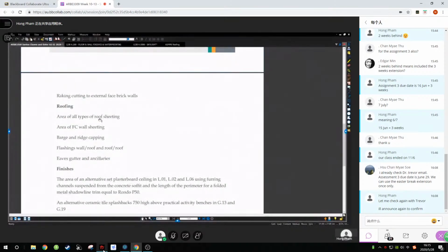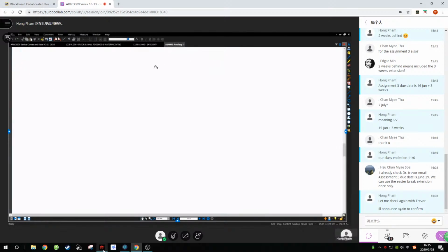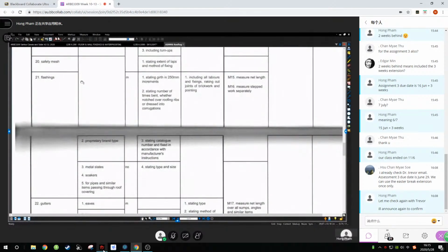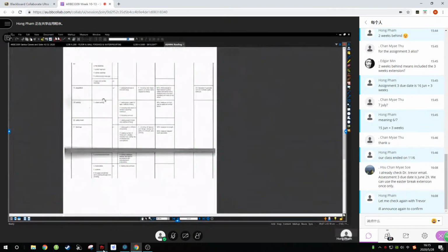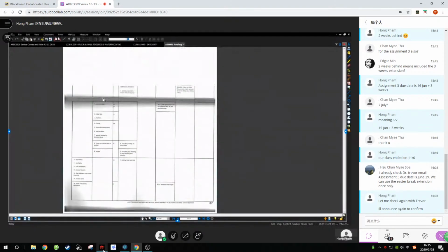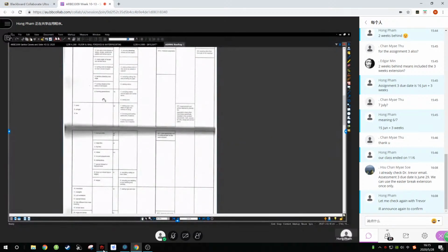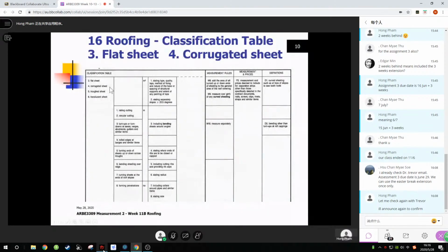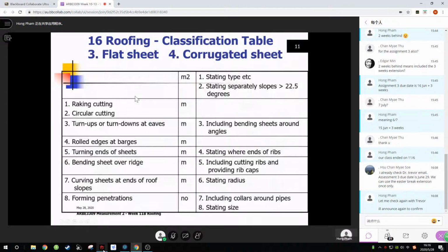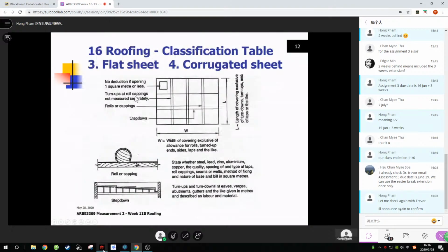They thought, what would be a good idea instead of paying for the rolled cappings with this roll that's rolled into the metal? We'll get a piece of 40mm PVC pipe and we'll cut it down one side and we'll slip it over the edge of the corrugated iron sheet. That's a really good theory, but it didn't work very well because it's very hard to keep it on there and very hard to get it straight. So they were trying to save 50 cents in material, but spent about $10 in labour trying to get it on, and it looked a bit dodgy.